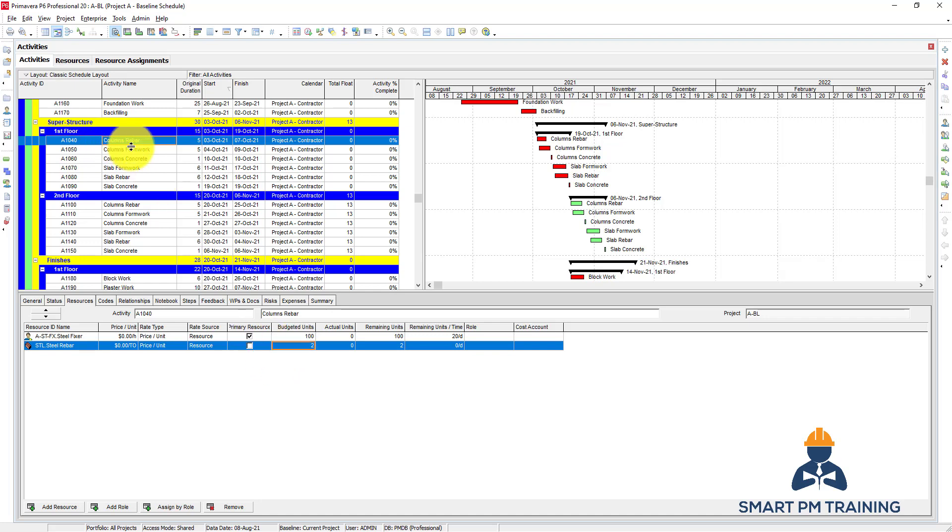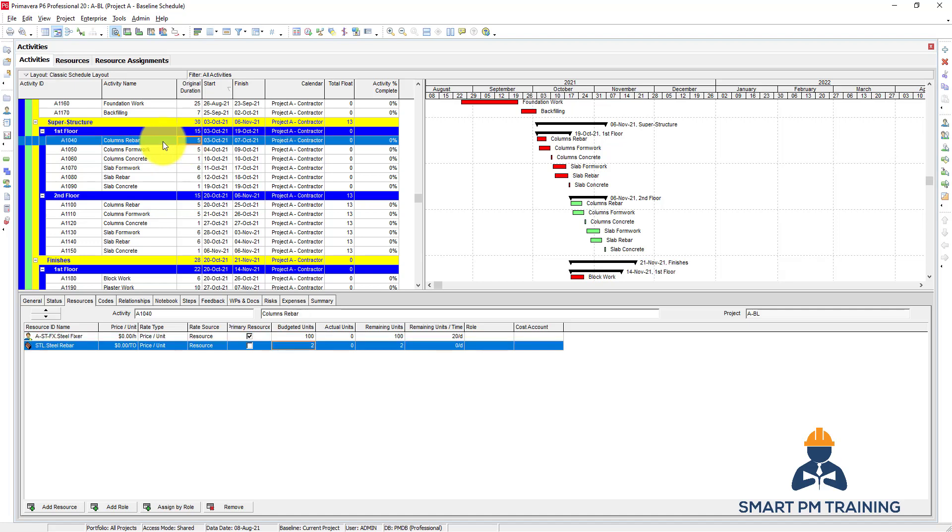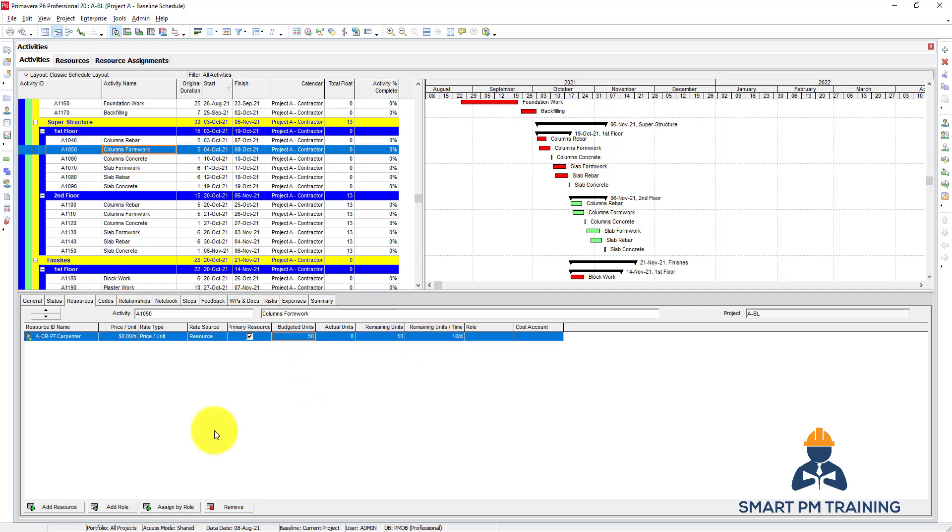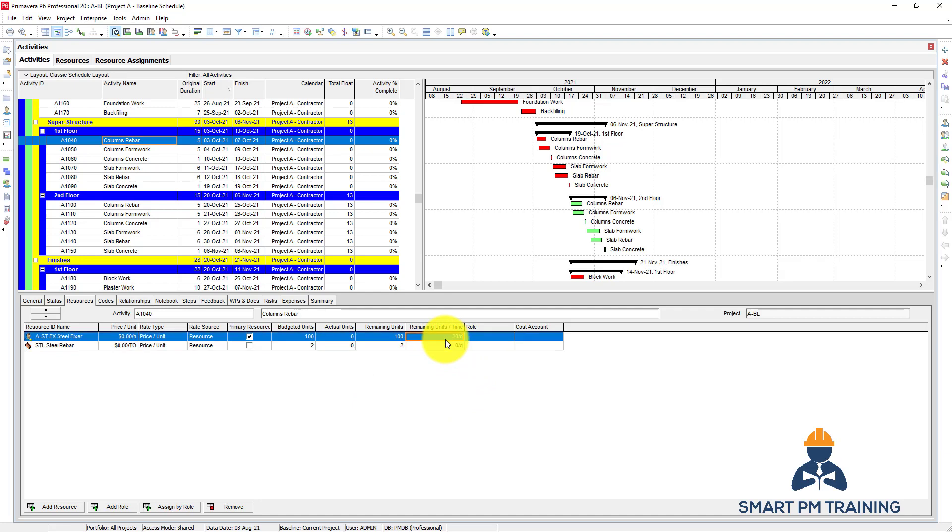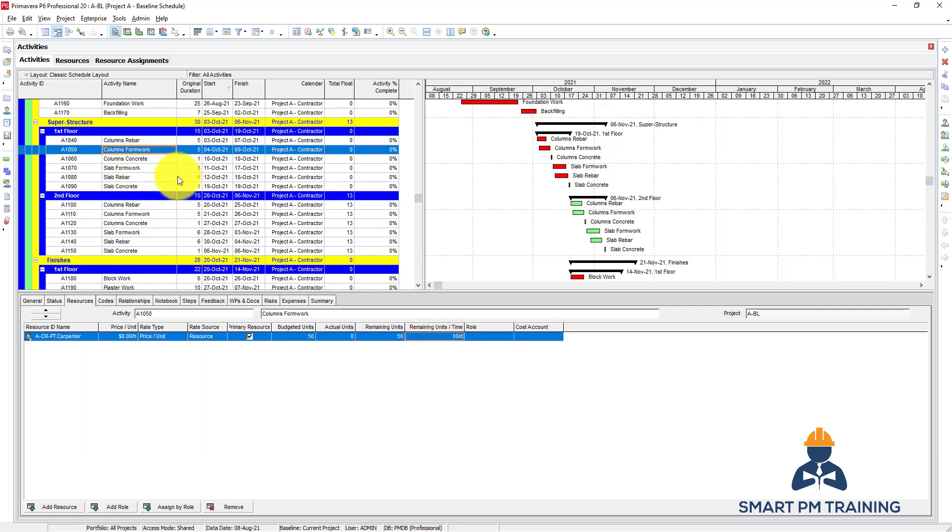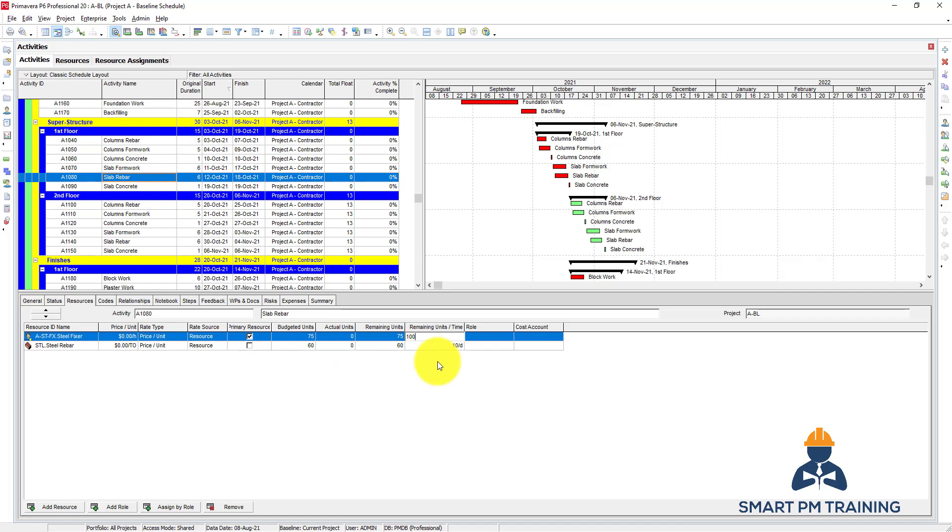You should have identified the labors, the planned labors you need to assign for each activity, then you go one by one and just type the budget units or how many labor hours per day. Let's do the column formwork. I will need five labors - let's say it's a realistic number. Let's say 10 steel fixers and 10 carpenters. So 10 steel fixers working for 10 hours per day, so 100 hours overall per day. 100 here, and also for carpenters the same. I want also 100 per day. Slab formwork also - let's just say that we have 10 labors, 10 steel fixers, 10 carpenters working for the concrete work in our project. We make it also 100.